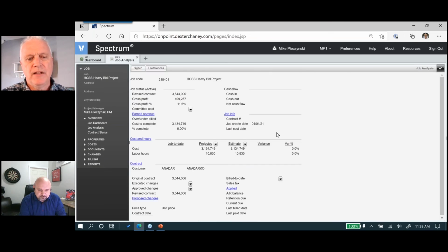to come to the job analysis. This is the first place I go after importing. Yes, the revised contract is right, 3.544. We've got gross profit of 400 and change with that margin. Well, the gross profit to be technically right. And then our estimate total is 3.134.